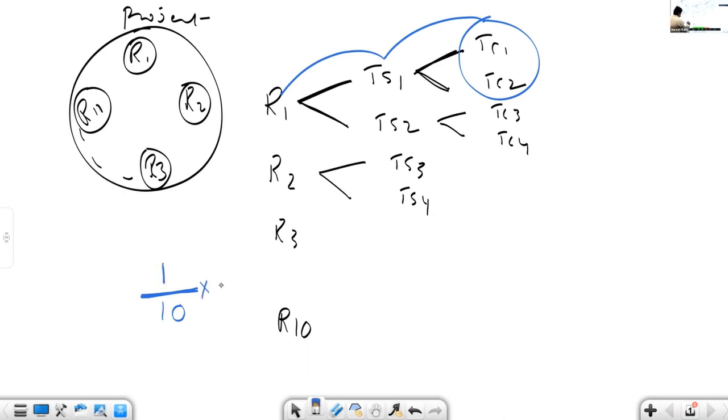So 10% of the test case coverage is achieved. Still, 90% of the test case preparation work is pending. The next day, again my team members created test cases. After preparing test cases, they map the test case numbers here.